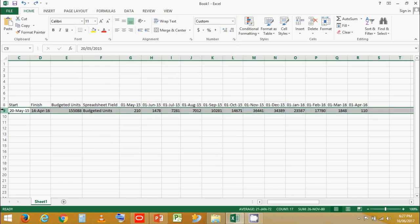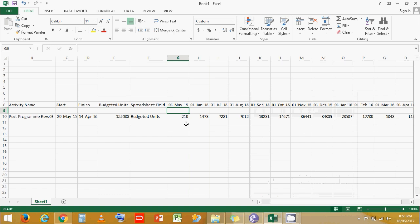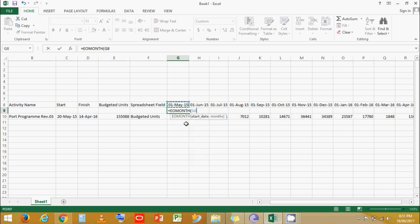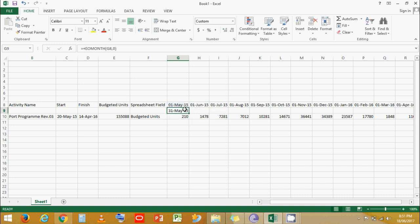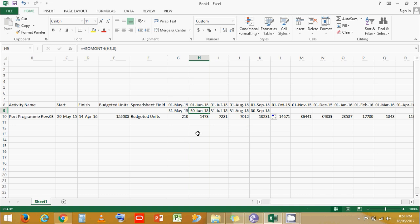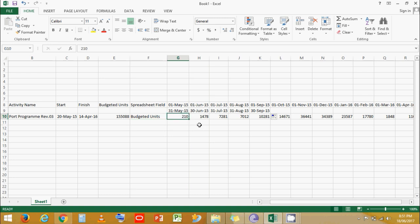Let's Control Z that. Another option in Excel is a formula that directly converts the month to its end-of-month date. Using the EOMONTH formula — select the month above and enter 0 — it automatically converts May to the end-of-month date, that is 31st May. Let's stretch it over all months. Now we can say that at the end of each month — May, June, July, August, and so on — we have those units representing labor.